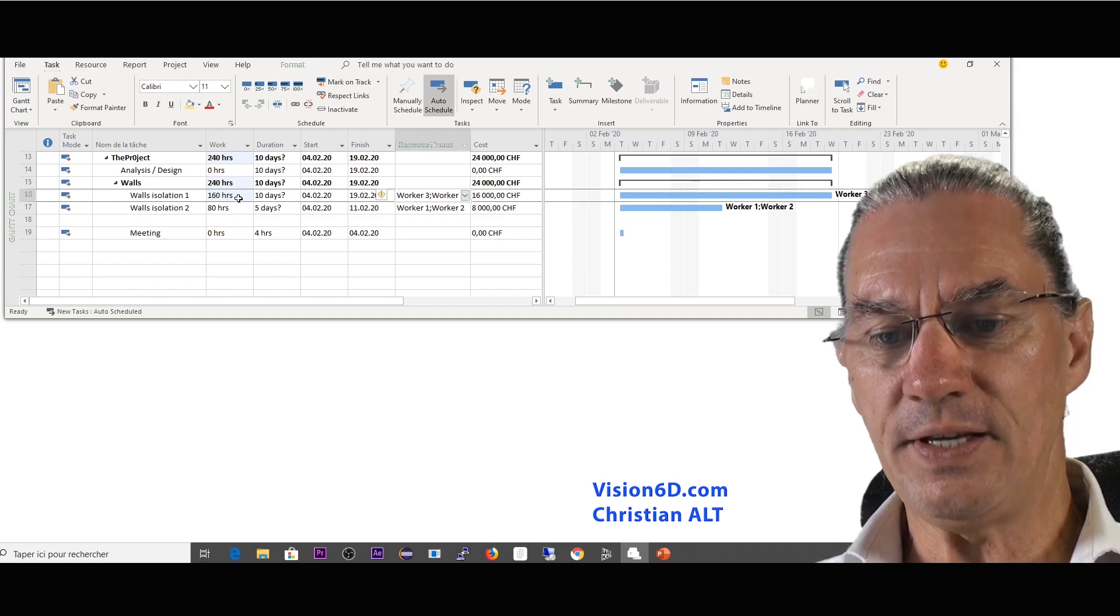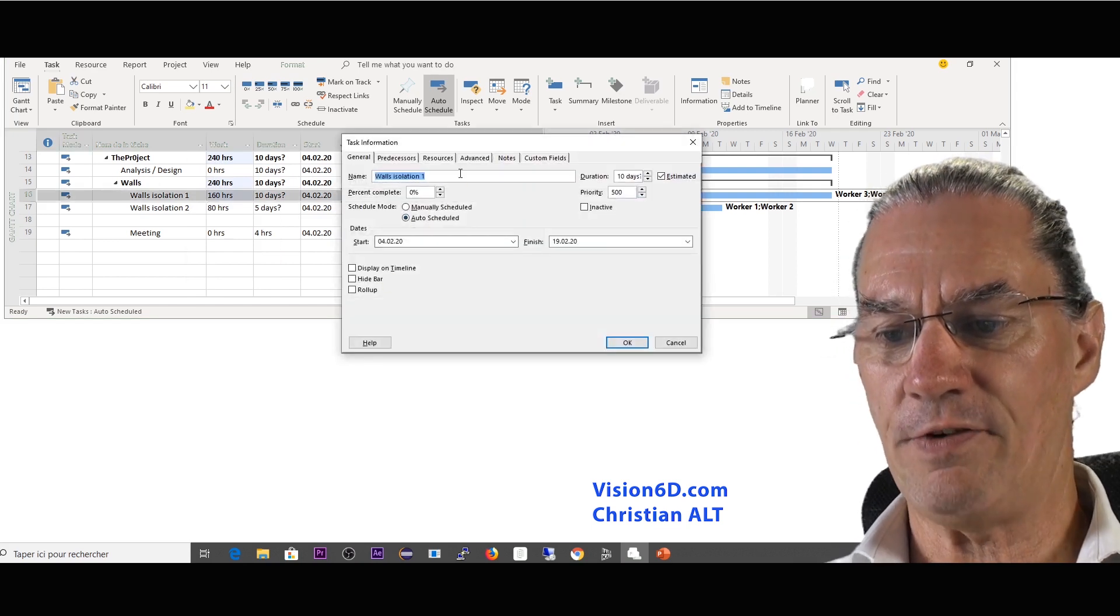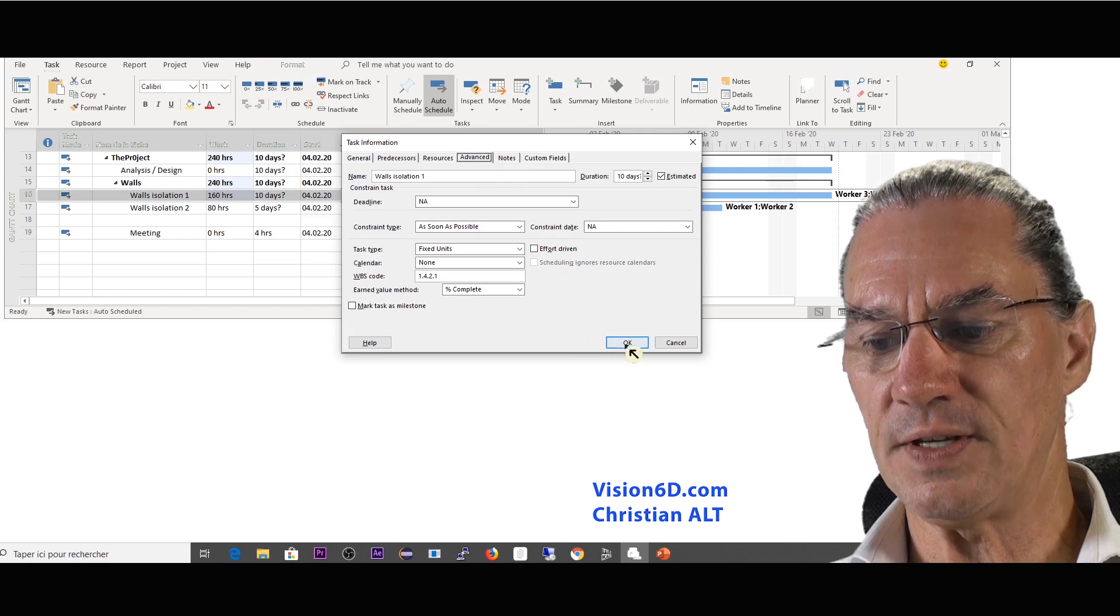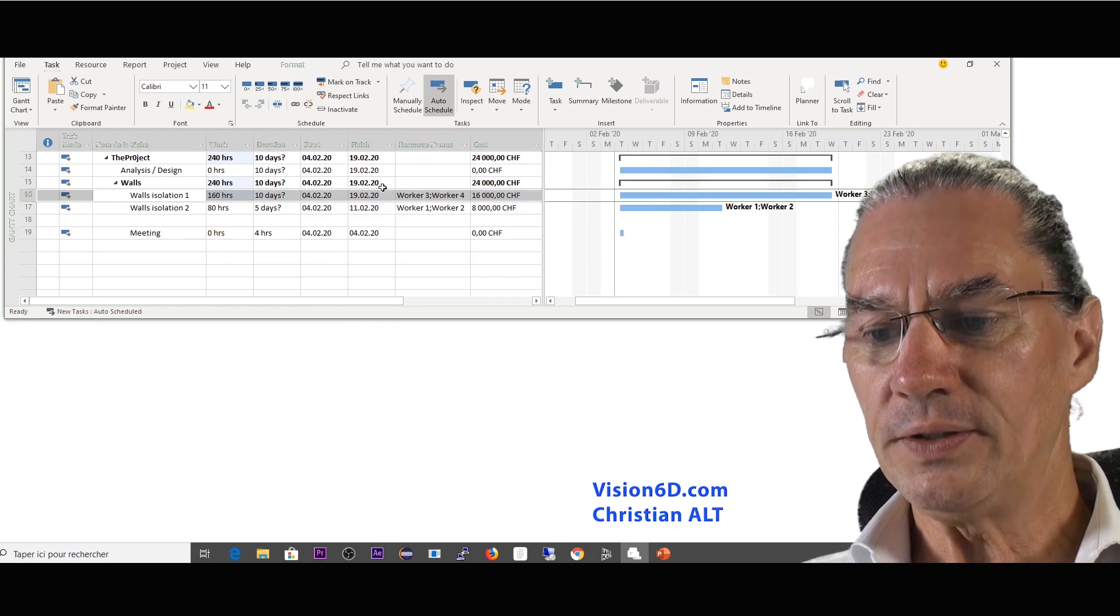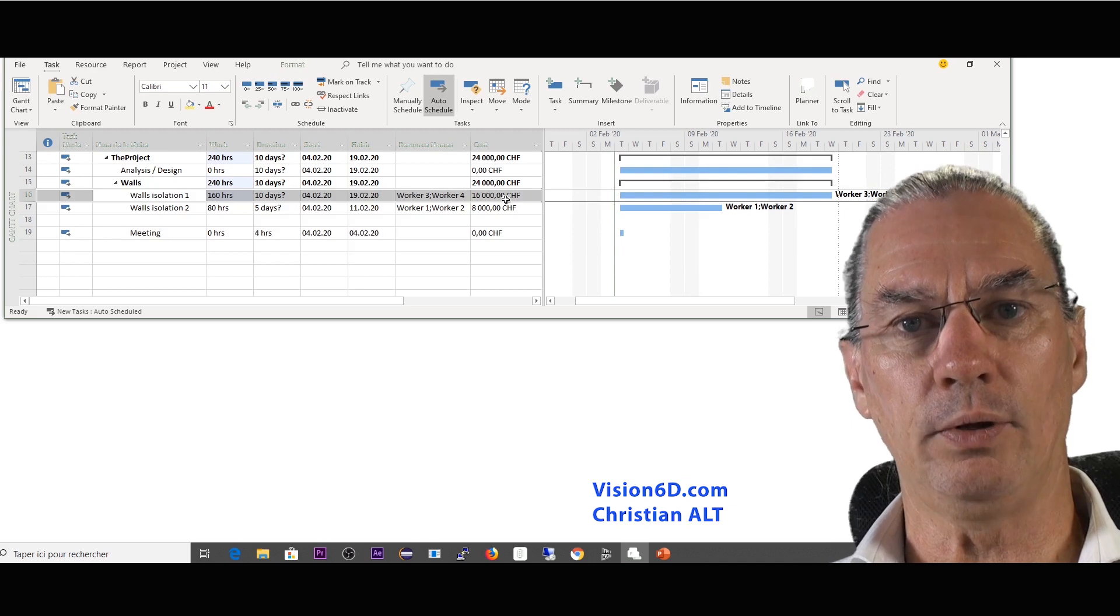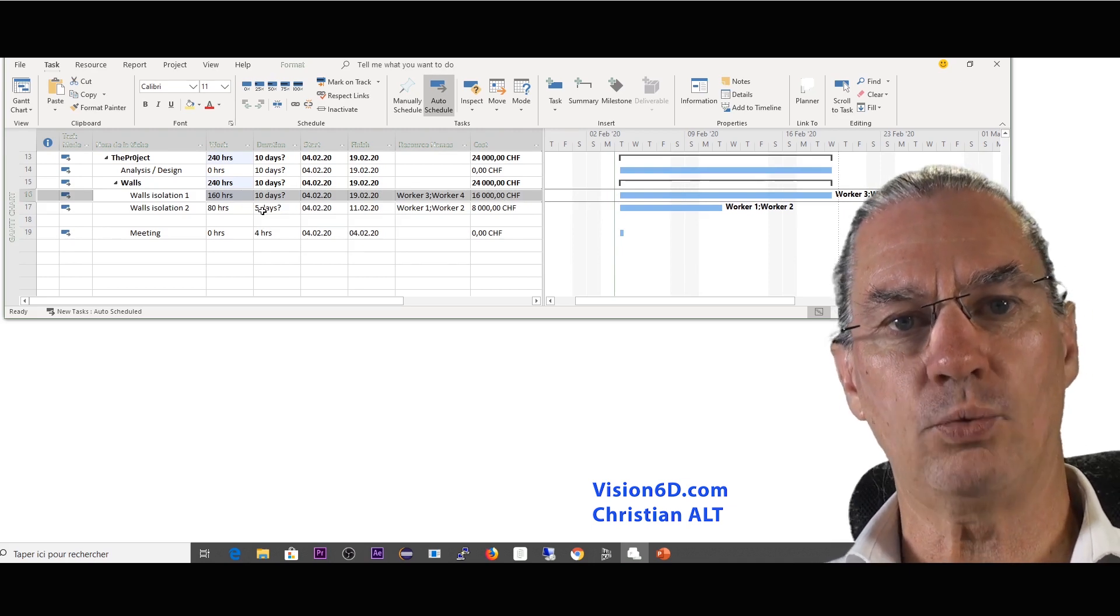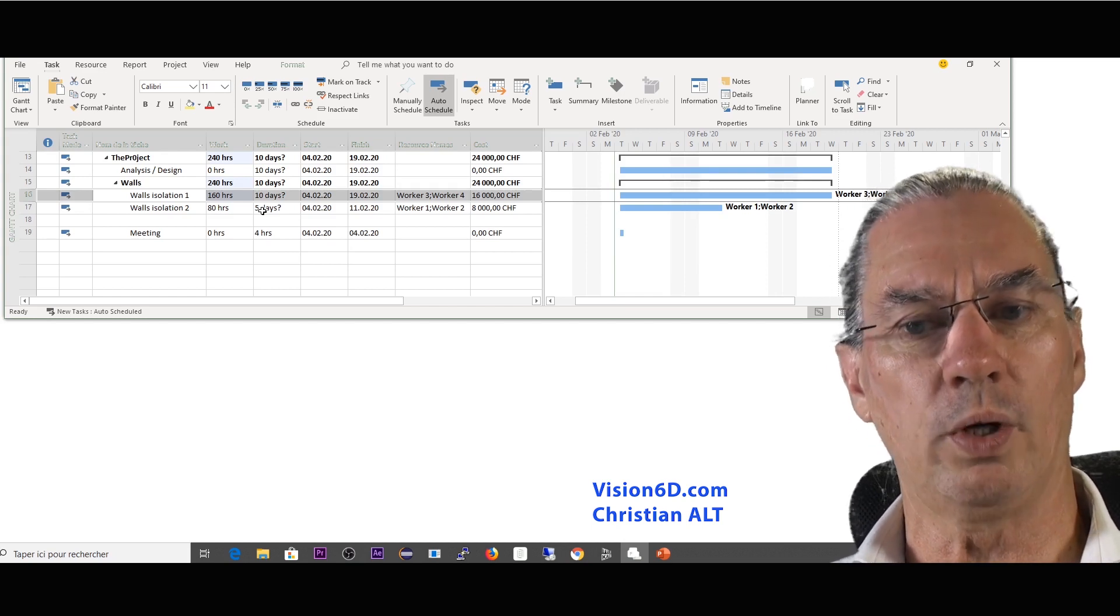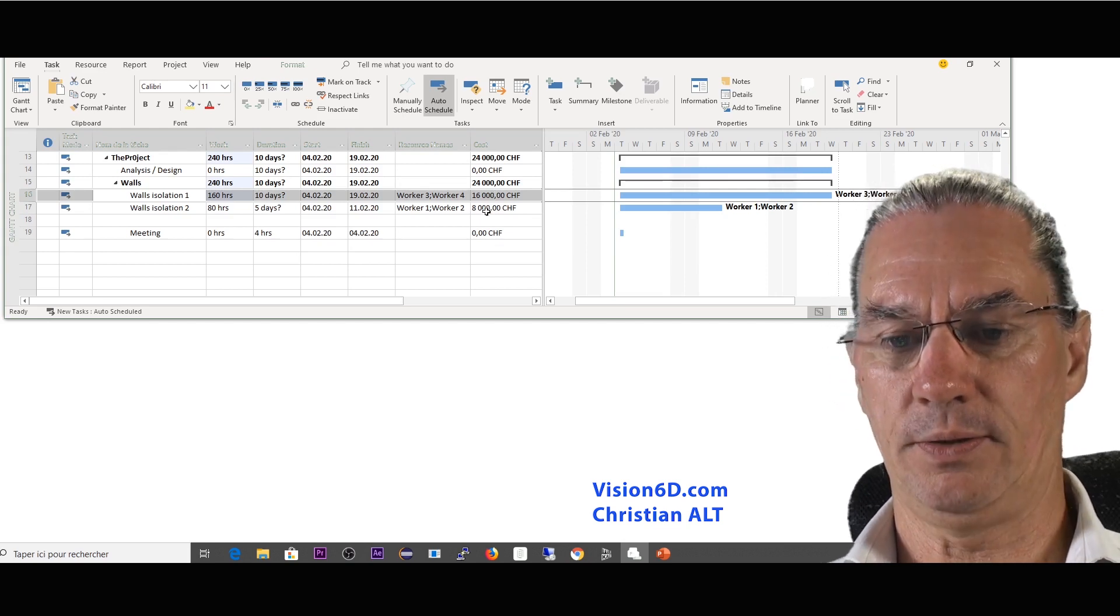And this is due to the fact that this task isn't defined as effort driven. You see this is the default how MS Project is doing it. So this will bring us the cost of those 10 days of work to double to 16,000. So you see the same thing but just that we forgot to click the right thing to express what we really want. We have here 8,000 more than what we expected.